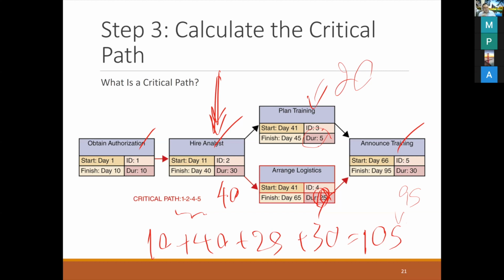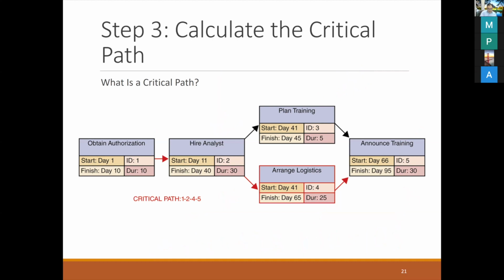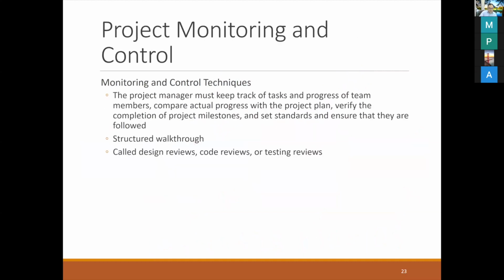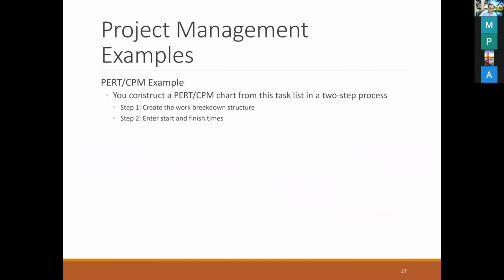The whole project duration is still the same because task 3 is not on the critical path. So that's why if you don't plan a realistic duration for each task, it may cause the project to be delayed.